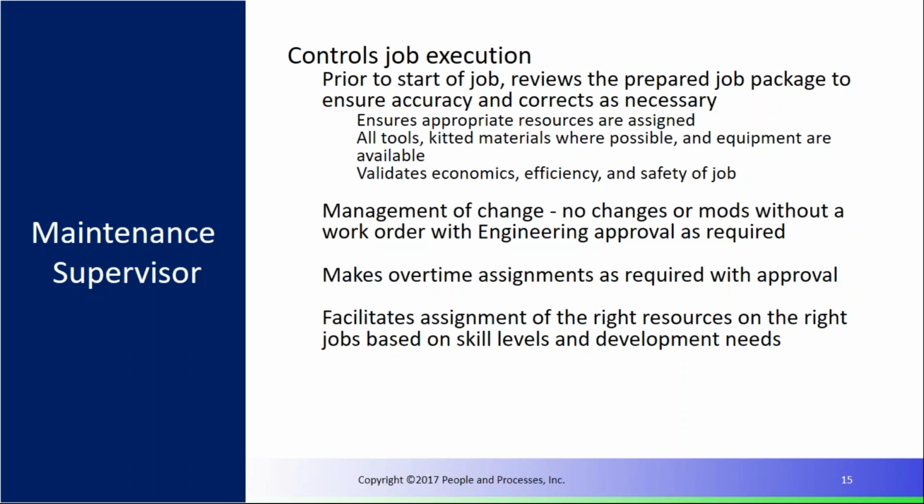And we talked about that supervisor having responsibility for execution of the schedule in the current week. Well, for example, you may look and say, well, I'm not getting these jobs done. Let me ask Fred and Sally to stay over. And, hey, can you guys work this afternoon and finish these jobs up and get us ahead a little bit so we can get caught back up on the schedule? That's the kind of overtime assignments that I'm talking about. And the frontline supervisor should have the flexibility to do that, working with maintenance management. And also, that supervisor is the one who actually puts the names to the task.